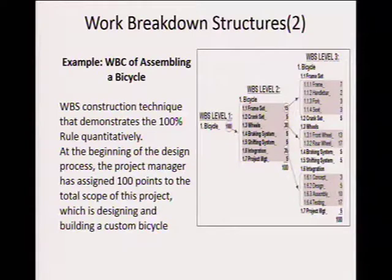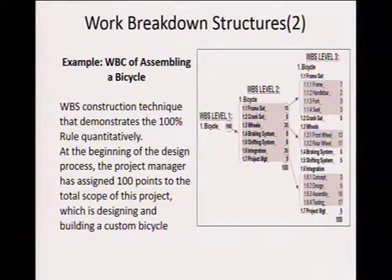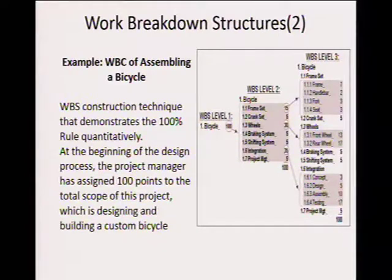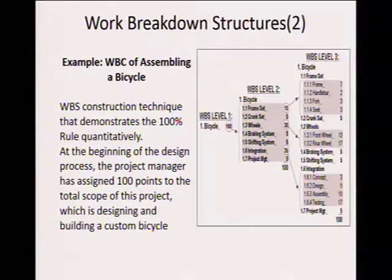The work breakdown structure in construction is a technique that demonstrates the 100% rule qualitatively. At the beginning of design, the project manager is assigned 100 points to the total scope of the project — for example, designing and building a custom bicycle — and then each activity and what is to be done is defined. In project management, all the information that you need or what needs to be done must be correctly and consciously put together. There is nothing like an afterthought.